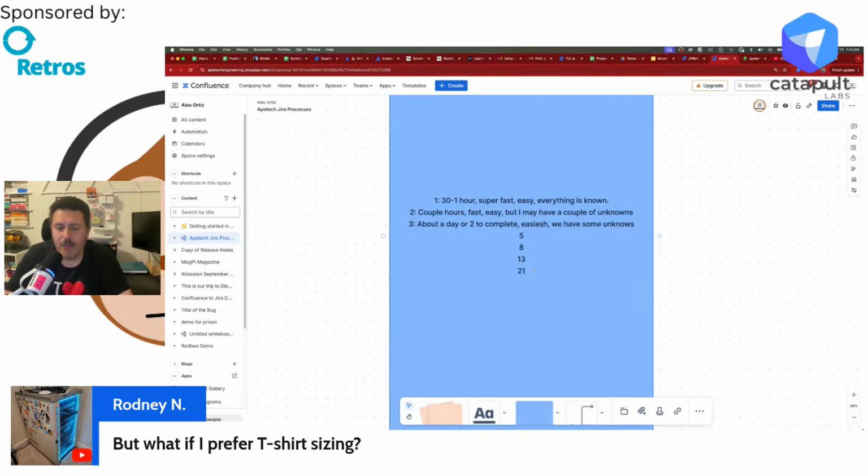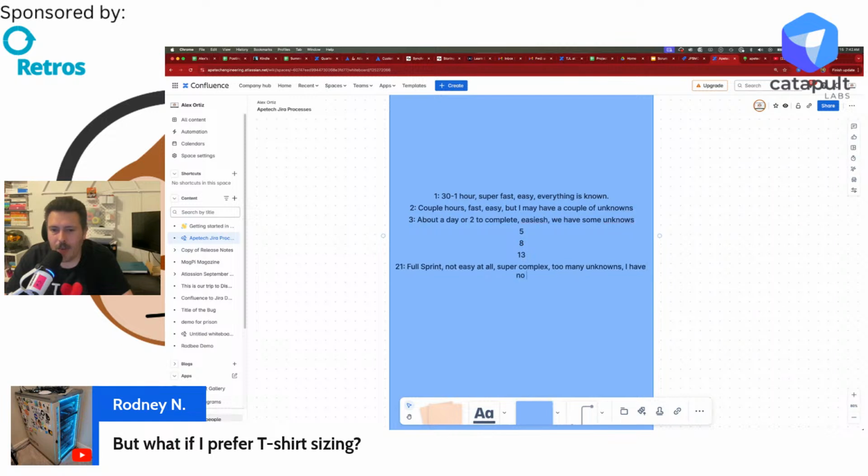But what I want to leave you off with is you should also have the 21, right? Which means full sprint. You need the whole time, you need all of it, right? Not easy at all, super complex, too many unknowns. I have no idea what I'm doing, right? And when your team gives you a 21, that is for you to go, okay, we need to break this down.